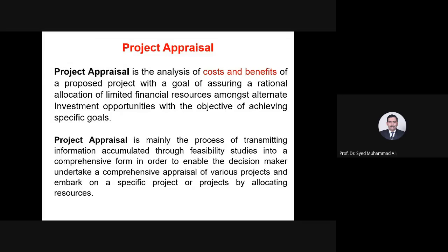I think the revised one has more. When you prepare your project PC1, the P&D department, planning and development department, has engineers, other people and economists who review it. Based on their review, they either accept it, reject it, or defer it with certain suggestions that need to be made.